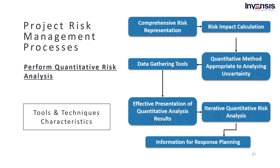Also, we have data-gathering tools. These tools used in this process include assessment of historical data and workshops, interviews, or questionnaires to gather quantified information — for instance, on the probability of a risk occurring, a probability distribution of its potential impacts on resources such as cost or time, and even relationships such as the correlation between risks. There must also be an effective presentation of quantitative analysis results. Results from the quantitative tools are usually not obtainable in standard deterministic project management methods.